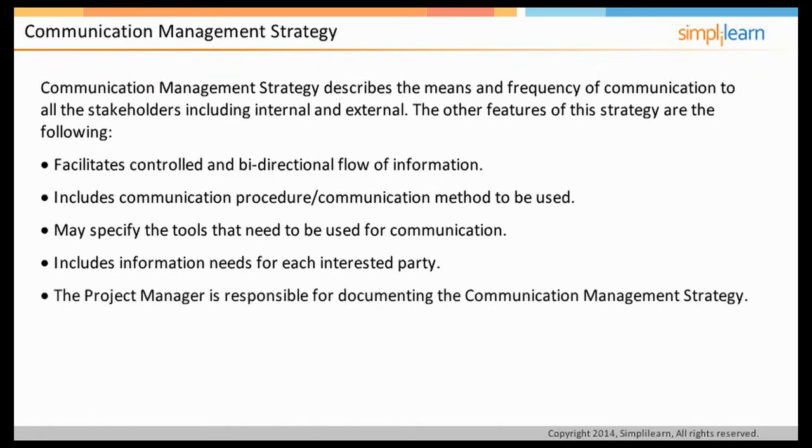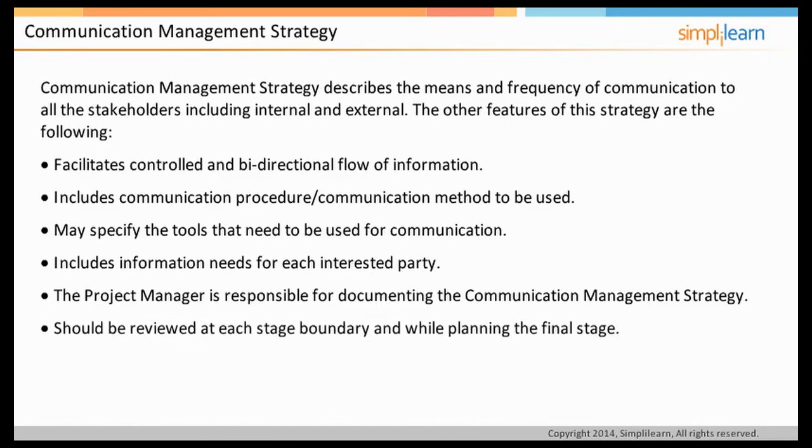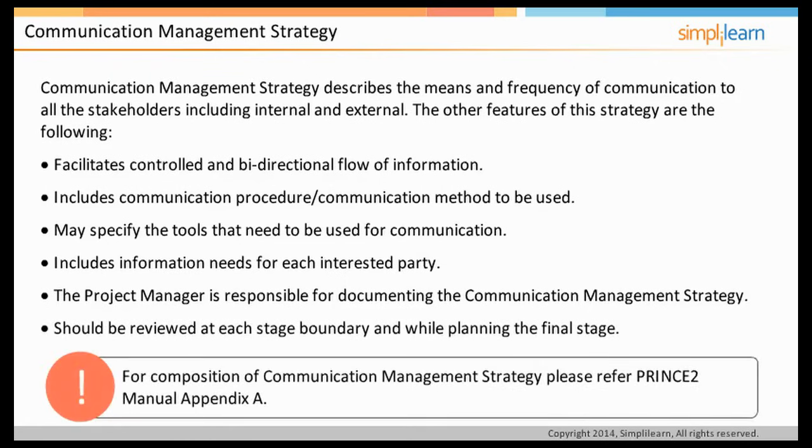For example, a project manager prepared the communication management strategy while initiating the project. However, during the project, one of the suppliers changed. During the next stage boundary, after the supplier is off-boarded and the new supplier is onboarded, the communication management strategy needs to be updated by deleting the old supplier and putting the name of the new supplier instead. This change has to be approved by the project board. Hence, PRINCE2 suggests that communication management strategy should be reviewed at each stage boundary and while planning the final stage. In the following few screens, we will look at the responsibilities of the different roles in this theme.